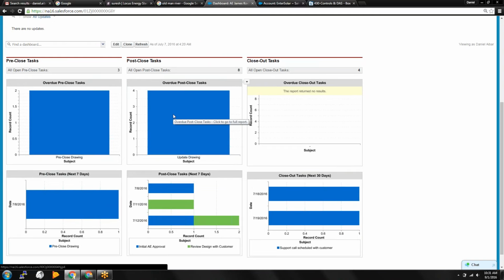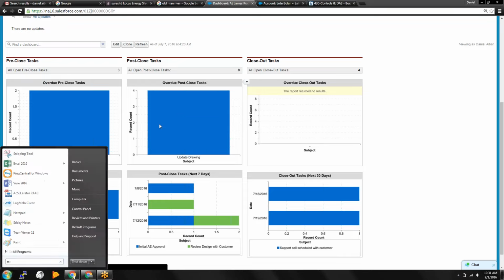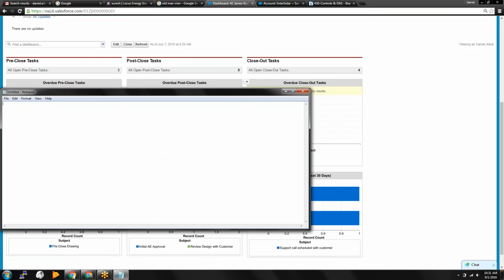Post-close is right after the opportunity is sold. There's a few things we need to do. These include, let me pull up my notepad, reaching out to the customer over email. We also have a design review that we would like to schedule with the customer. We have an update to our drawings.